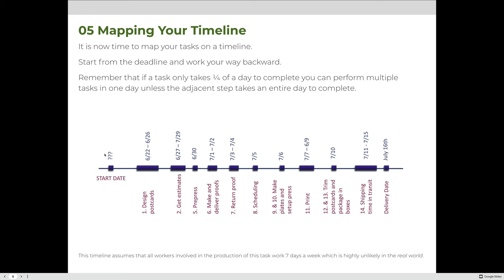So if a client comes to us in April, say April 6th, and asks if we can get this job done, we can absolutely say yes. We can tell them that if they want delivery to Des Moines by July 16th, they need to have everything submitted and the contract signed by June 1st. If they say they can't get files to us until June 16th, we can still make the deadline. But if they come to us on July 7th asking for delivery by July 16th, we have to tell them there's no way to finish in time.